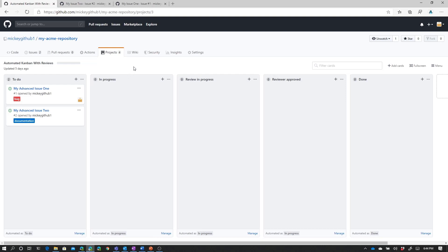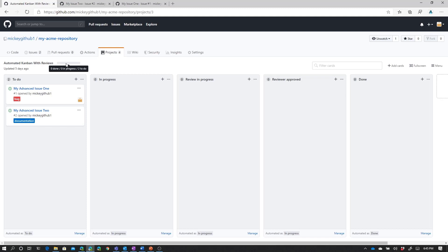And as we did in the previous video, we added two issues to this. One of the things you get with boards that have automation in place, and you can see that I have automation in place, because I can see down here that this column is being automated as to do. This column is being automated as in progress. Several of these are. And then this one's being automated as done. But when you have automation on your board, you get a tracking progress bar along the top of your board. So here we can see that right now we have completed zero cards. We have zero cards in progress, and we have two cards currently in the to-do column.